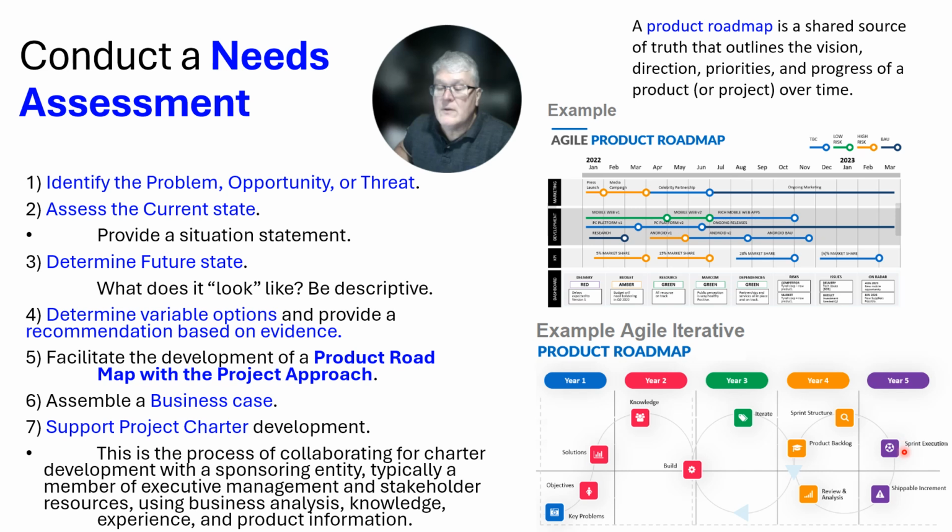And then what would happen, you go into your sprint execution, you do the things that you were talking about in it. You might figure out, okay, are we ready to do this? And I'll talk about the definition called definition of ready. Do I have all the things aligned to be able to work on this thing? And then if you're done, you have something called the definition of done, and that would be a checklist to say, okay, here's all the things that we were going to do in whatever my work package. I've got those accomplished. So by checking my list, it looks like we are done.